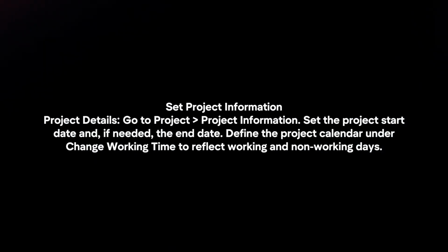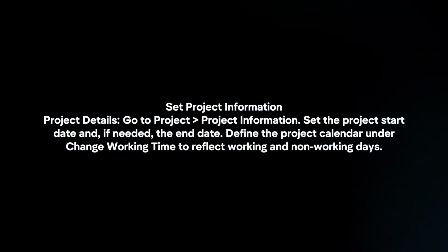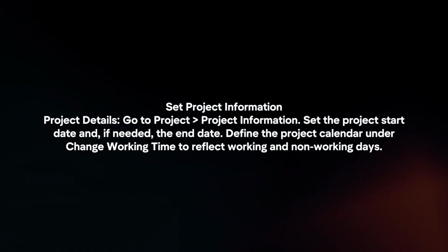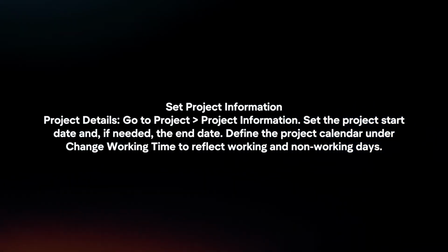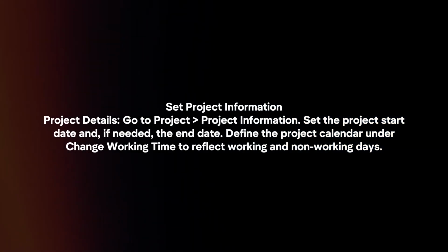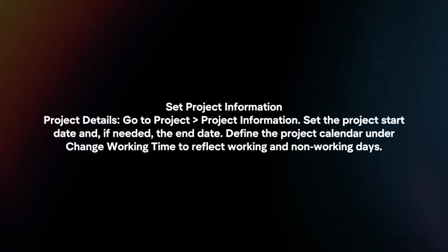Set project information. Project details. Go to Project, Project Information. Set the project start date and, if needed, the end date. Define the project calendar under Change Working Time to reflect working and non-working days.